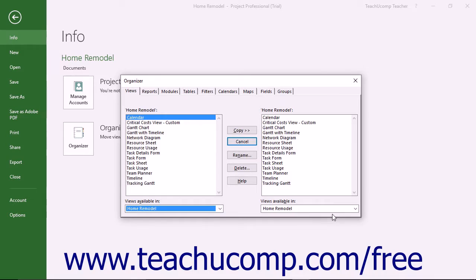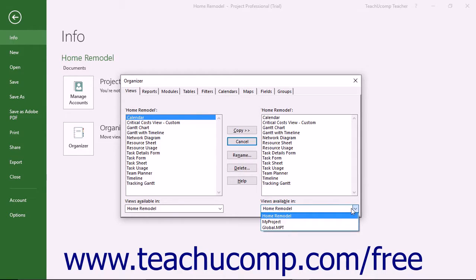Then use the right Object Name Available In dropdown to select the name of the project file into which you want to copy the object.